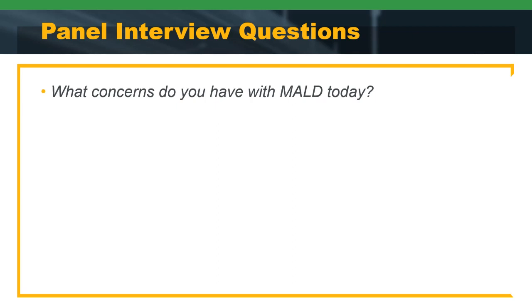That day can't come too soon, right? Cannot. Yeah, and so before I turn it over to Alexa for the next question, I know our contractors told us early on that we became maybe too concerned about the data from the standpoint of our template drops were way too dense, and they said they would get that information and the first thing they had to do was start stripping things out right and left. So going to that consistency point, being consistent and having a process that every contractor knows what they're going to get is a huge deal.